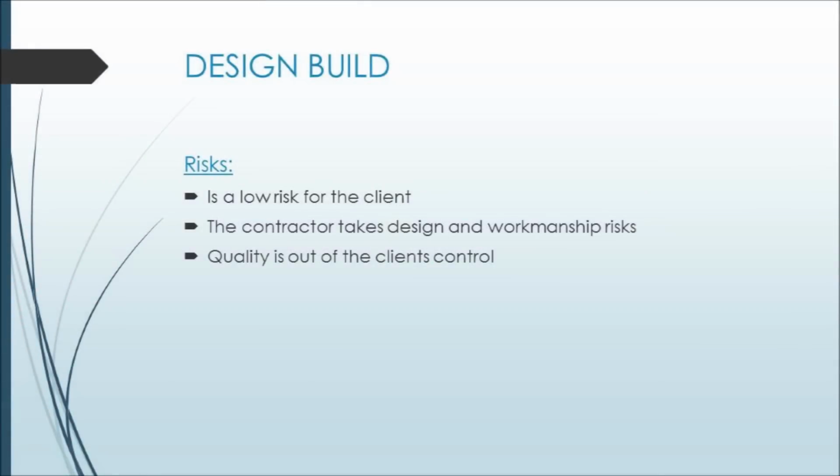The risk is low, as the contractor gives a guaranteed maximum price and a finish date at the start of the project. The contractor also takes the design risk and the workmanship risk, but quality is out of the client's control. This could lead to you not being fully satisfied.